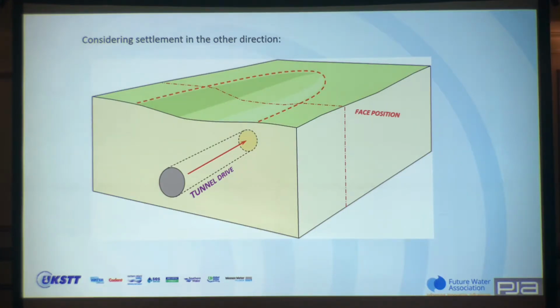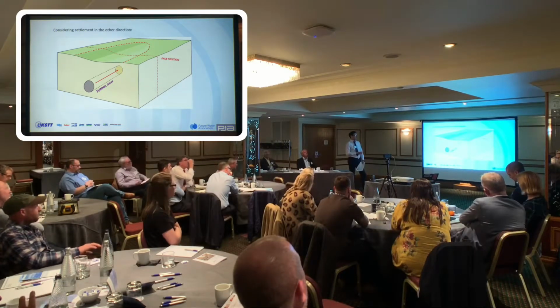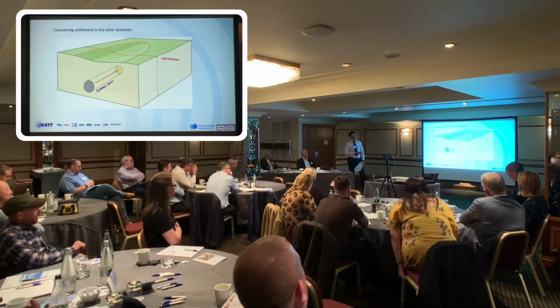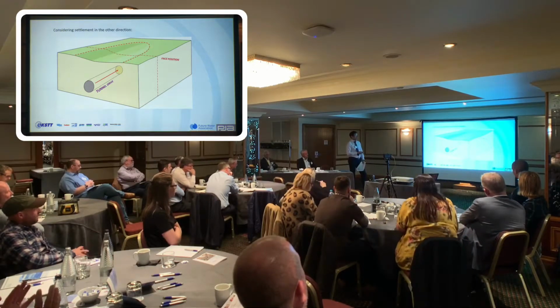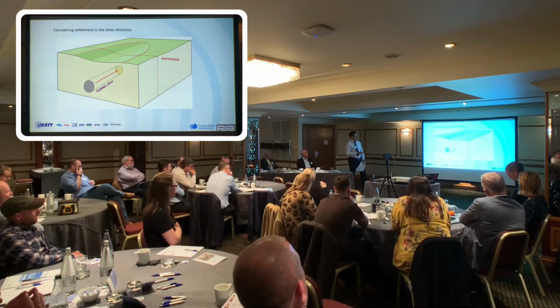If any more analysis is required, there is always the option of going into more detailed assessment, finite element analysis and 3D modelling, which will give you a very defined result, but that's a bit more expensive and takes a bit longer to develop models and what have you. So as long as you satisfy the criteria based on conservative assumptions, then you're happy.